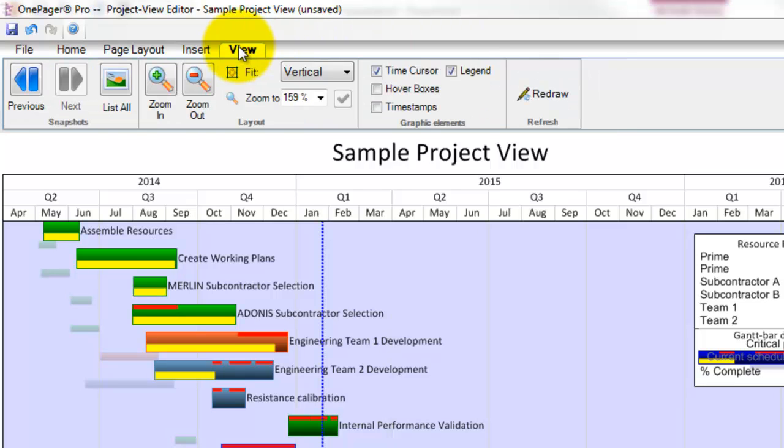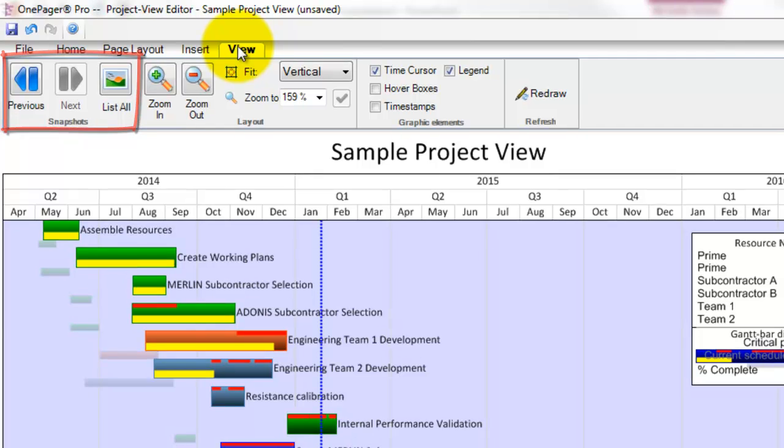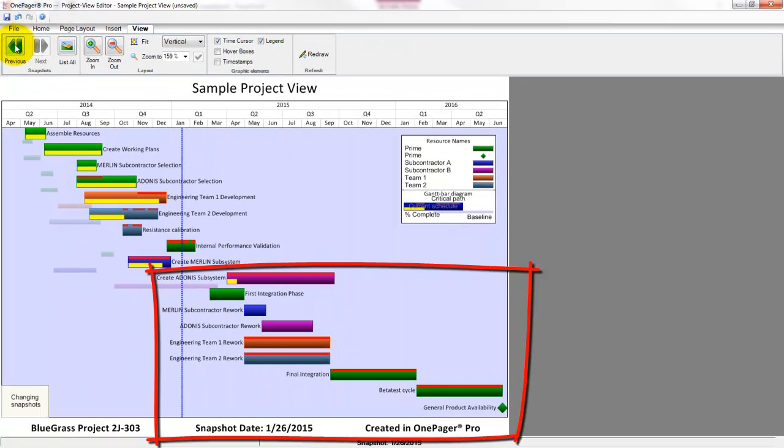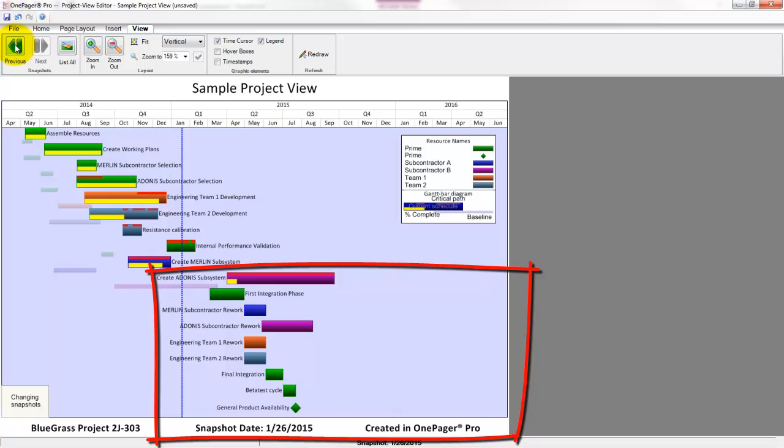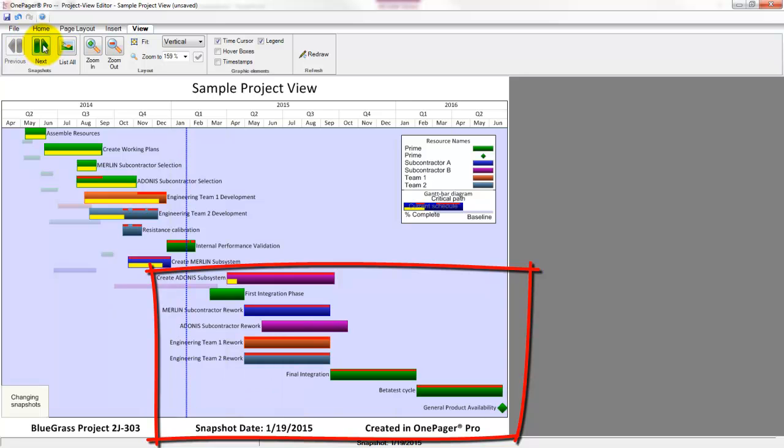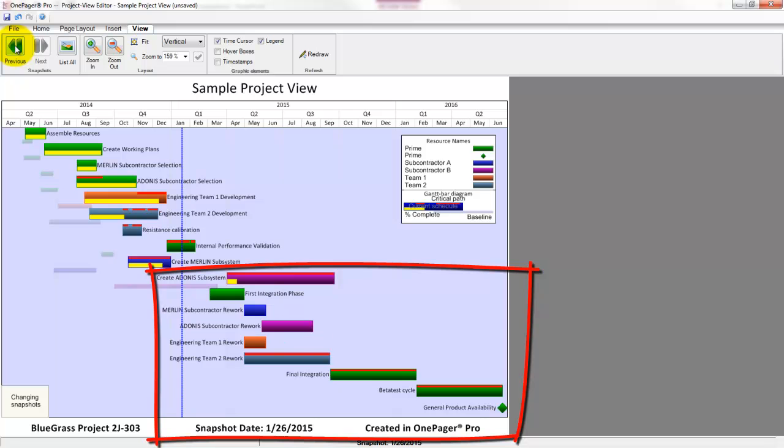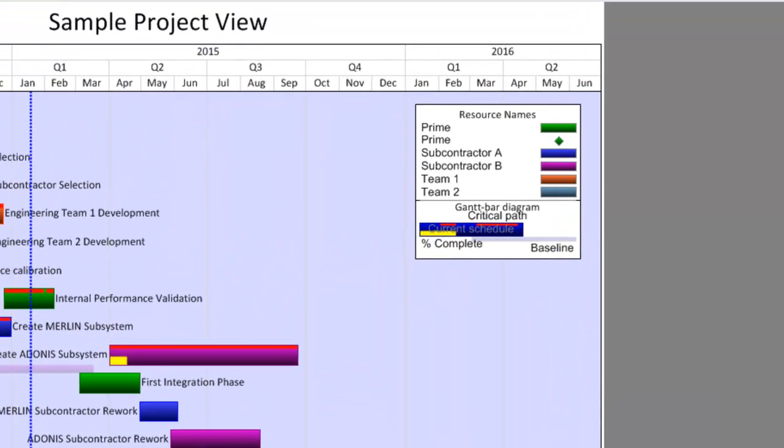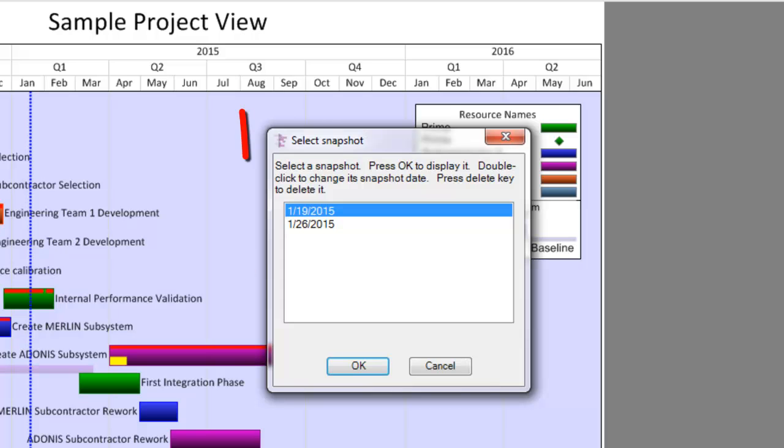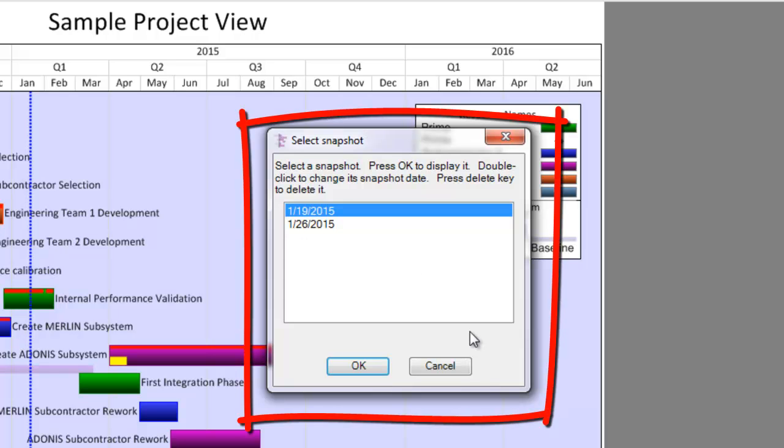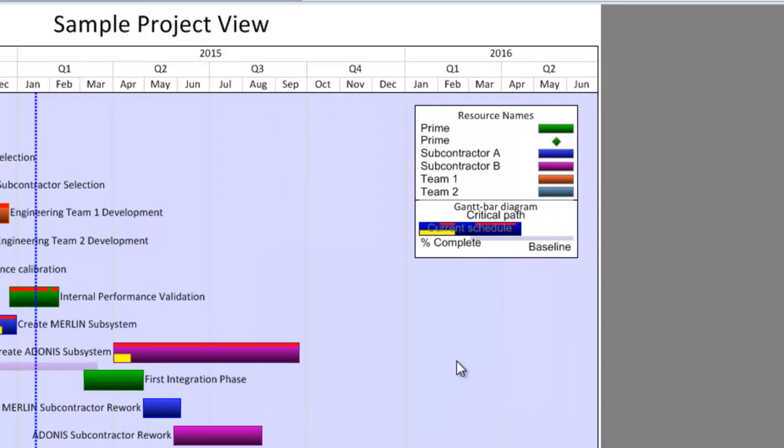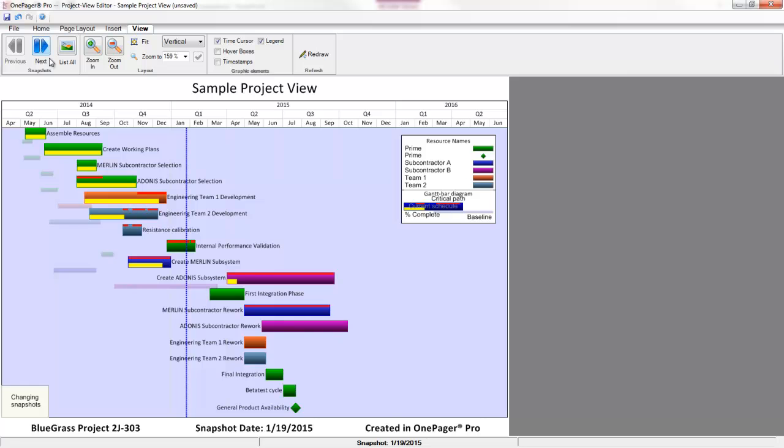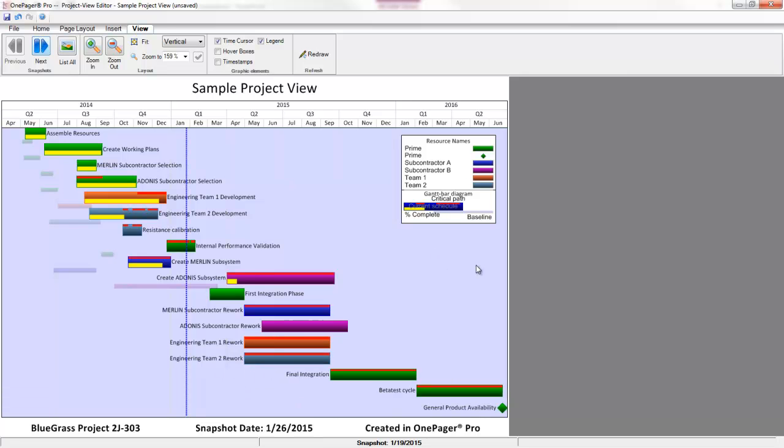If I navigate to my View tab, I can now see that I have a blue Previous button illuminated up here in my snapshot navigation buttons, which, if clicked, will allow me to step back from the more recent snapshot to the previous snapshot, and I can see some movement on the screen which is indicative of the change that has occurred from one week to the next, kind of like a movie or slideshow. This allows you to collect a cataloged history for how your plan has evolved over time. There's no limit to the amount of snapshots you can create, and you can manage your snapshot dates or delete unwanted snapshots if needed. If you like this feature, it's there, but you don't have to use it. As noted, you can always use one snapshot and constantly click the Replace option whenever you go to conduct the update.